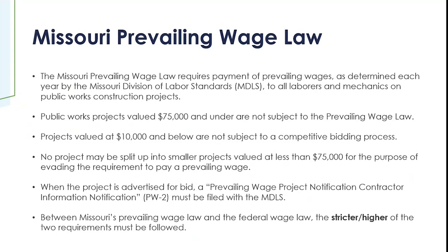CDBG projects are required to obtain both the federal and the state wage determinations applicable to each project and evaluate the worker class and make sure that the payment is the higher of the two. Okay, so whether it's the federal wage or the Missouri state wage, you must assure compliance by paying the higher of the two. Subrecipients are encouraged to review the other related documents.